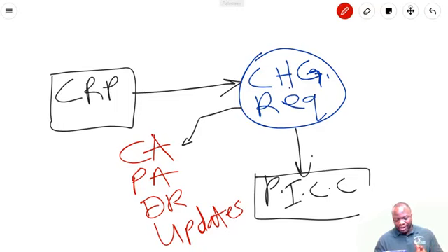The key word there being realigned, okay? Preventive action is an intentional activity that ensures the future performance of the project work is aligned with the project management plan. Then we have defect repair, an intentional activity to modify a non-conforming product or product component. In other words, it's defective. We need to fix it. And then we've got updates, changes to formally controlled project documents. Get that? Formally controlled project documents, plans, and so on.